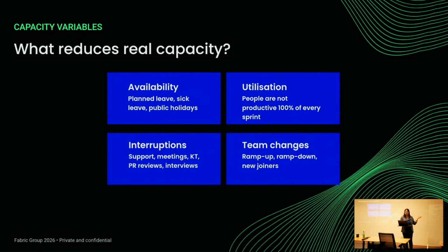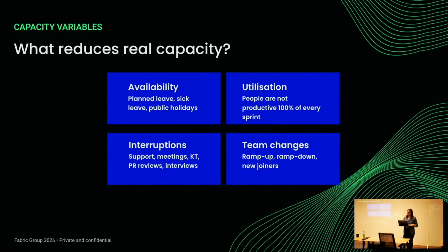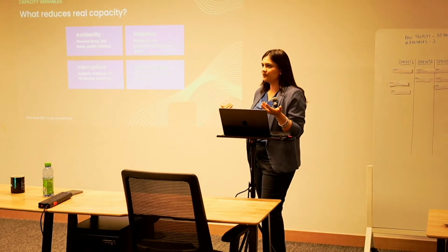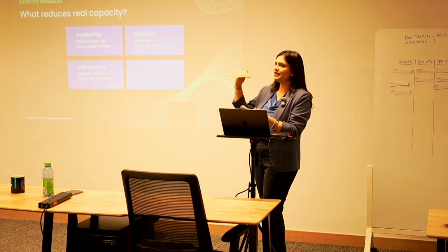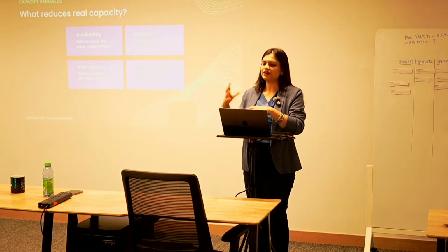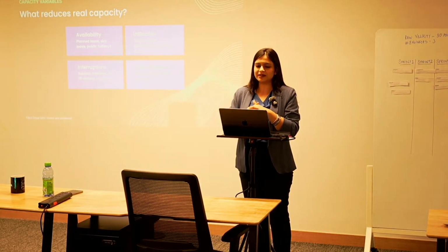Ramp up, ramp down is very, very important. Like I talked about, onboarding everybody on day one is the recipe for chaos. We had done that in one of my earlier projects with another client in another company that I was working for. We had like 10 people joining the client and the project team on day one, and nobody really knew what to do. So it's really important that we slowly ramp things up.